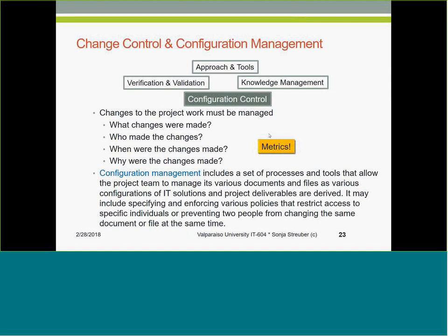Then the configuration management team will perform another review of all our test results and the user acceptance test results. Only when the configuration control team is confident that our newly written code or our newly built hardware is not going to break anything that is already in production, then it will be deployed.